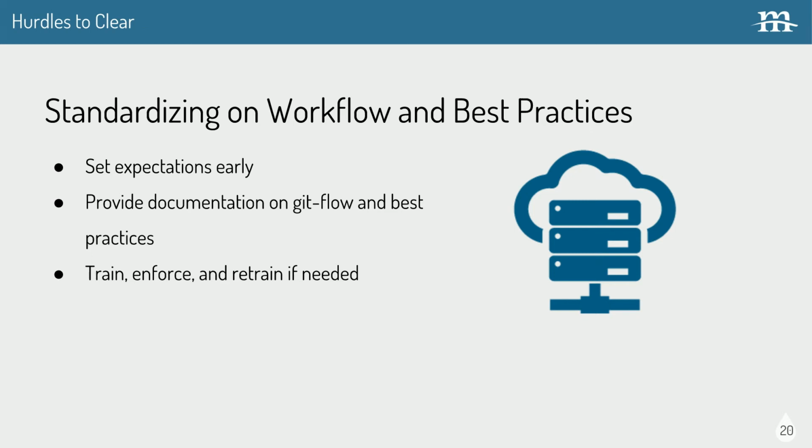When it comes to multiple vendors and task ownership, you have to do the same as you did for stakeholders. Don't silo your vendors and client-side developers. You need to treat them all as one team and treat them as if they're on your team. But set boundaries around who's responsible for what. When you have tickets set up in Jira or another project management system, make sure you're assigning those to specific individuals. You can set up labels and components to identify if a particular vendor is responsible for a set of tickets or group them by epic.